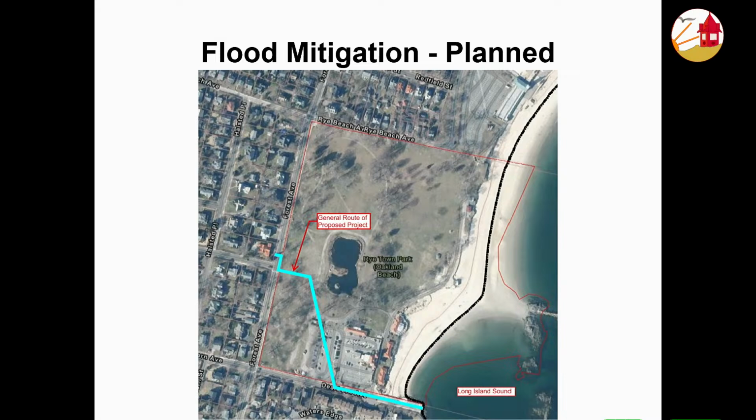And the study resulted in a plan from our engineers, Dahlfrotfeld Engineering, Division of AI Engineers, as they call themselves now, main engineer being James Santarelli. That resulted in a proposal, and we have submitted a grant request to FEMA that would fund approximately 75% of the cost. The project is projected to cost over $3.5 million, so that is quite substantial.